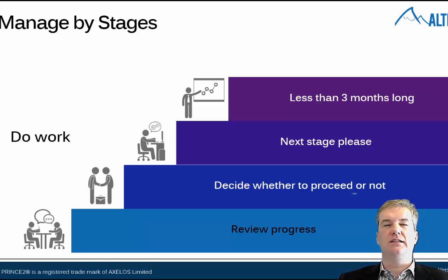And generally a stage is less than 3 months long. I think if you're thinking agile, which is a buzzword that's out there at the moment, you might understand that they look at a 1 month project. But PRINCE2 defines it around 3 months. It could be shorter, but I wouldn't be pushing it out much longer.